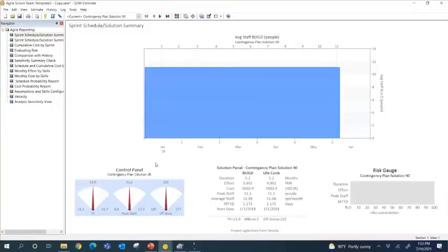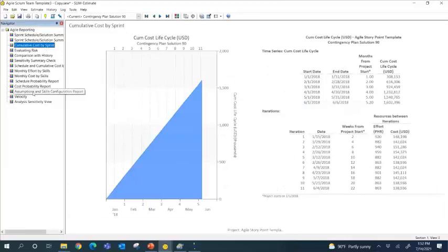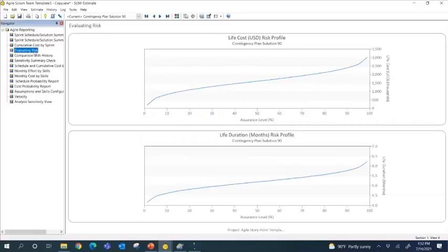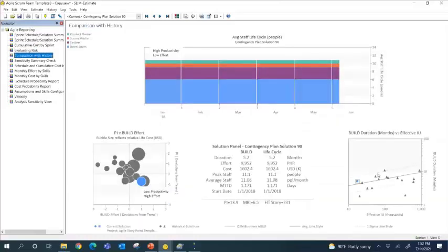And then you did that high-level estimate, and then Slim will calculate the cost per sprint. It will calculate the velocity, and it will let you evaluate the risk, and it will let you sanity check that estimate with the most recent Agile projects. There it is. So there's my estimate in blue, the industry trend line from our most recent Agile projects, and then those triangles are, hypothetically, your projects from that data manager that you chose to pull in because you knew the characteristics, because you analyzed them in Slim Metrics.